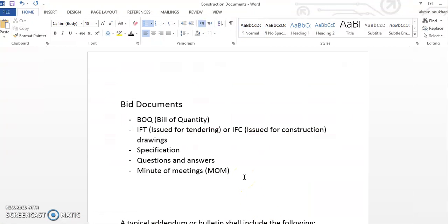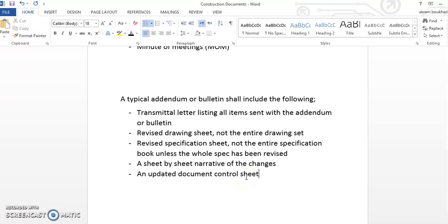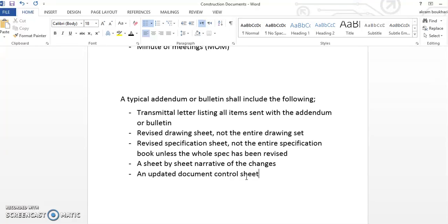What else should we know about addendum and bulletin? A typical addendum or bulletin shall include the following: whenever a bulletin or addendum is sent to you, you shall receive a transmittal letter listing all items sent with the addendum or bulletin, revised drawing sheet not the entire drawing set, revised specification sheet maybe only one division or subsection from a division unless there was a major change on the specification, a sheet by sheet narrative of the changes so they should tell you where the changes occurred, and an updated document control sheet which I showed before.